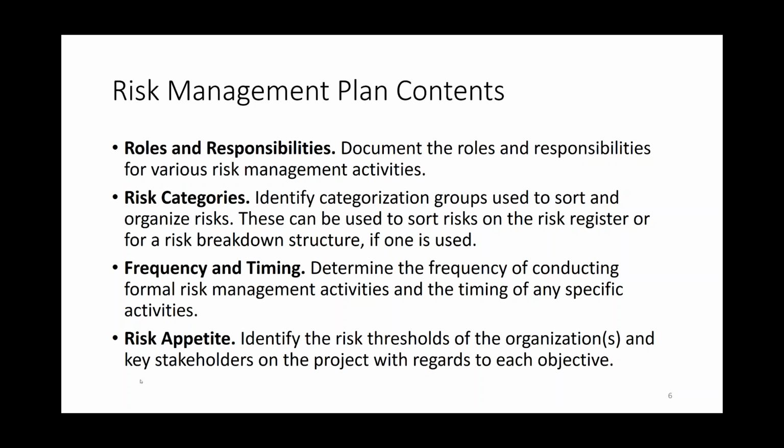And the tighter the threshold, the less of an appetite you have for risk. So a threshold that says I take action at 5% of the budget, or a straight dollar amount, anything that's going to have an impact of over $5,000, I take action at. That person has less of a risk appetite, or another way I might say that is more risk averse than somebody who says my threshold is $10,000.